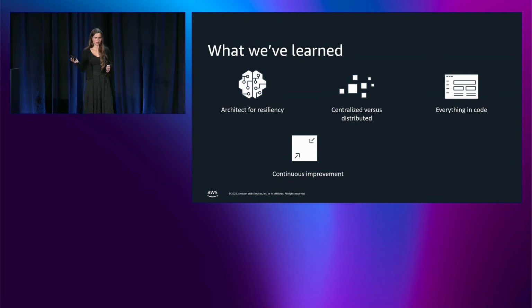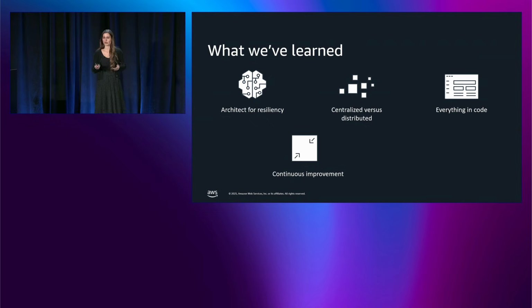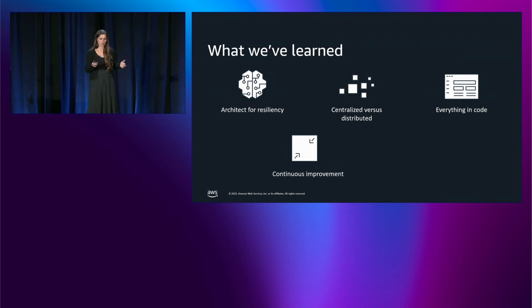Why would we have every single team work through the same issue? How about we cut a tracking sim, make sure it's documented, and we escalate that and ensure that the owning team resolves that centrally. And that way, the next build, this isn't an automation blocker for those 100 teams, and those 100 teams don't have to worry about implementing workarounds themselves.